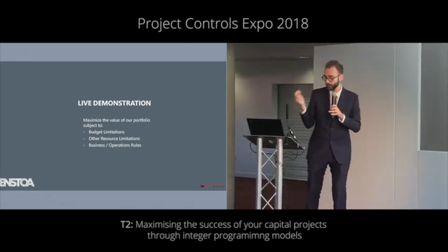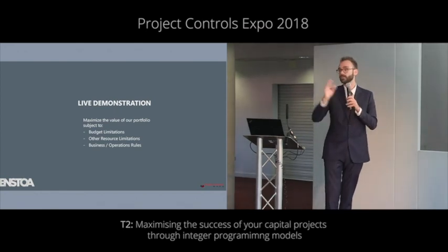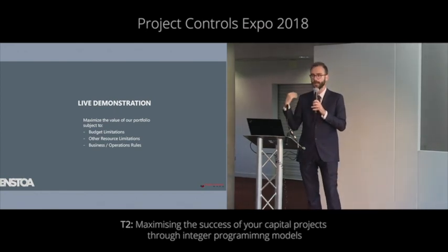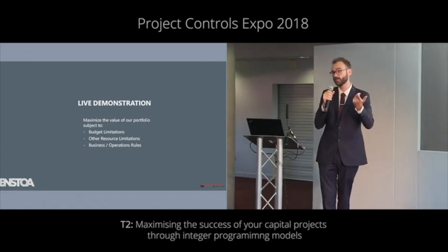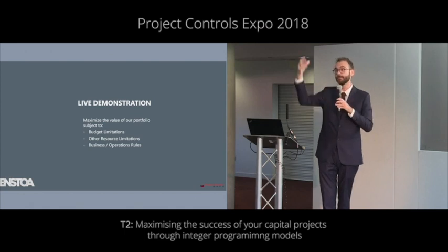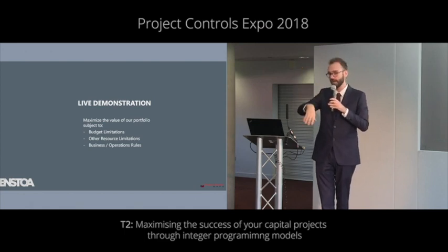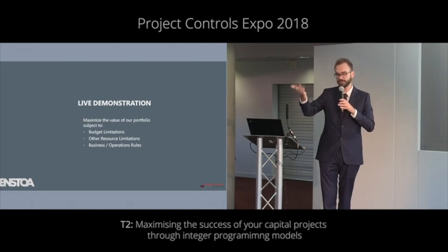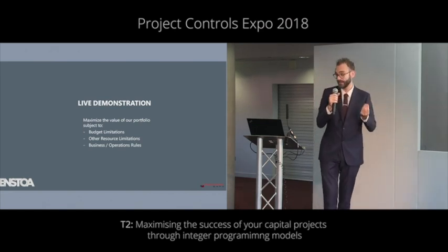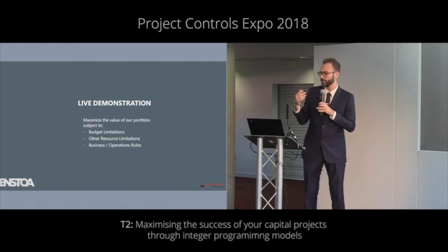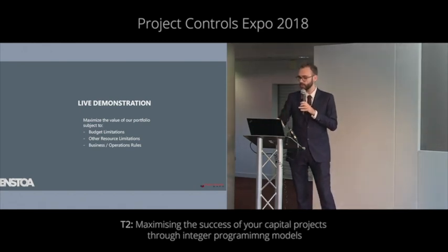If you want more inputs, the model can handle thousands of different constraints. I have heaps of them in my back pocket ready to go when users have interests in defining project relationships that say if project 1 occurs, then project 3 can't occur because they're supposed to be built on the same plot of land and we can't have 2 buildings on the same plot. So we can include constraints like that. If you want project 7 to finish before February 2022, we can include a constraint for that, and the model will only return a solution with that constraint satisfied. So there are a lot more constraints and a lot more data we can use, but this is a minimum input.